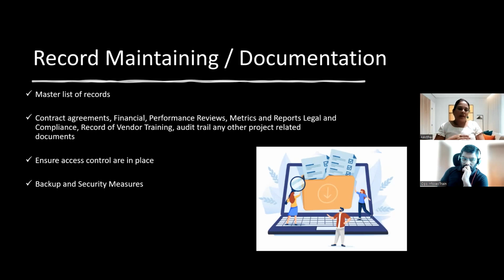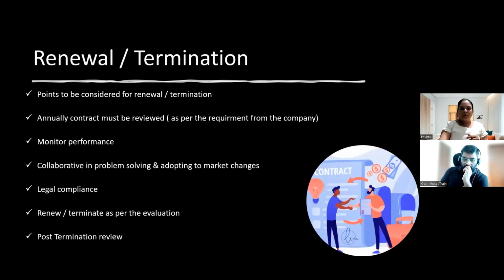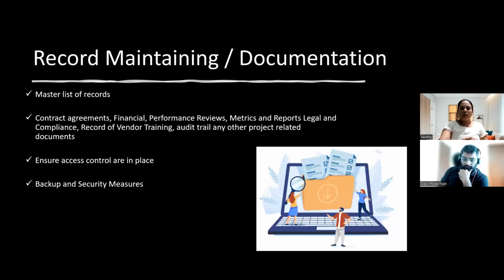Like the contract agreement, financial performance review, metrics, legal documents, compliance, and the trainings you give to the vendor. Why do I need to record the trainings of the vendor, you might ask. During contract renewal or termination, you can say, yes, I have trained this vendor on these topics. This might be your audit trail.